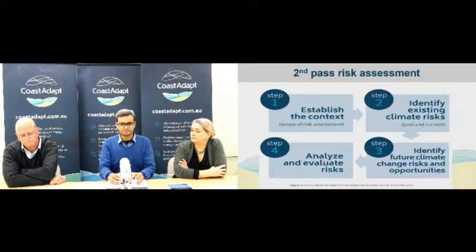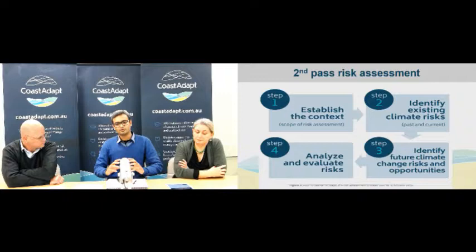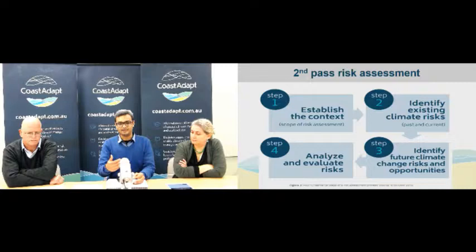And step two and three, where you identified your existing and future risk, are again different in second-pass assessment. In fast-pass assessment, both these steps were kind of binary, where you identified yes or no, whether you had a past event, whether you will have a future risk or not. But in second-pass assessment, it's more about doing a qualitative assessment. You try to identify whether the impact was moderate or insignificant, or it will have a significant impact.